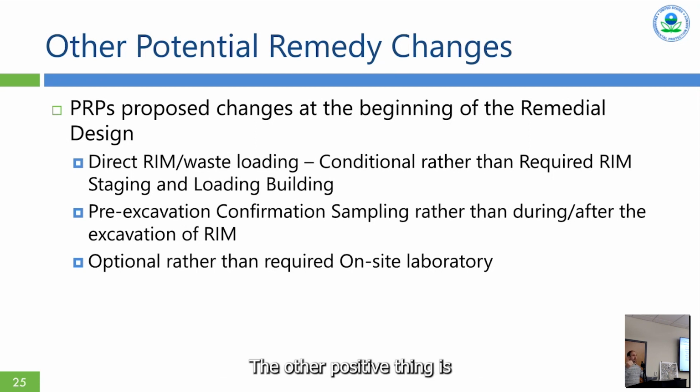The other positive thing is that it would be another step that would have to be done before excavation. So if we don't need that building, when we start RA, we're that much closer to starting excavation.